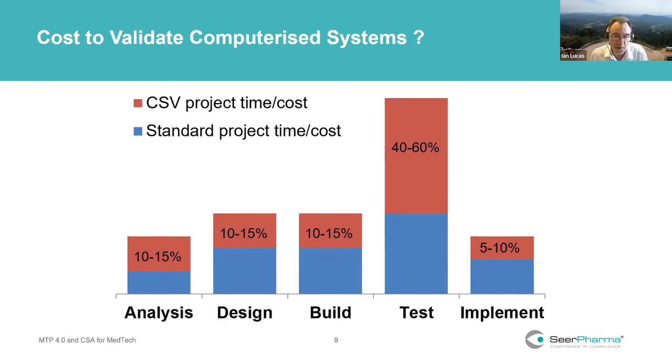There's no reason why you can't overlay a validation methodology on top of your agile, because agile is a development methodology and validation is putting quality over the top of that. So at the end of any sprint, you should have up-to-date requirements, you should have design documents, you should have test plans, and that part of the implementation that you've just done should be tested. So as long as you've got a good discipline that you can put over the top of your agile methodology, I have no problem. It's just that I've seen agile go off as like a prototyping, and they've started agile even before they've got